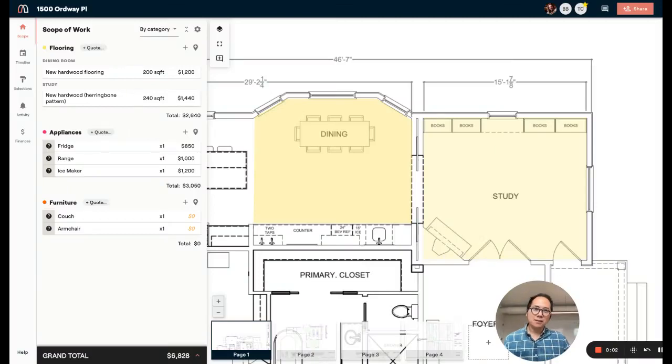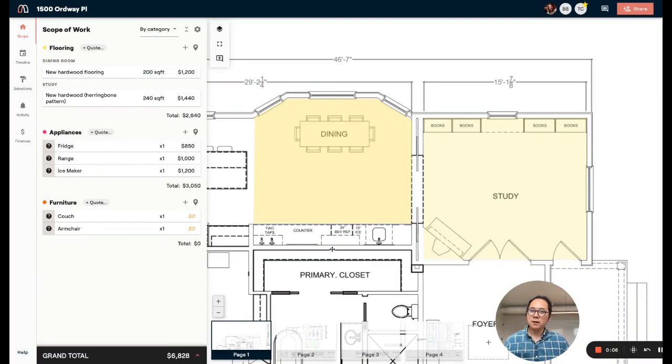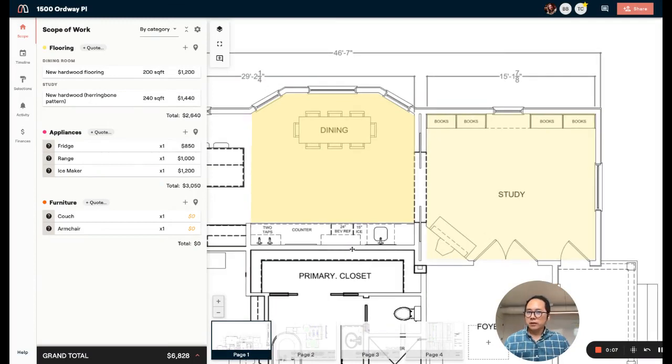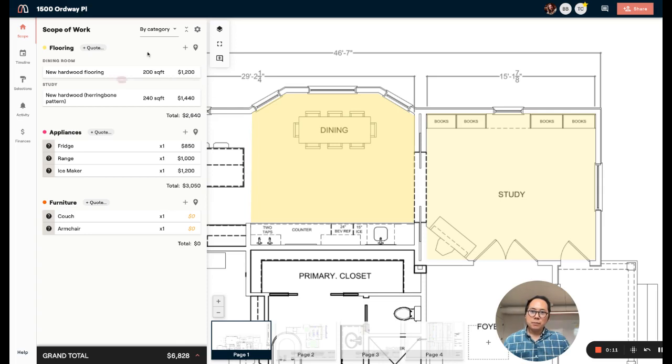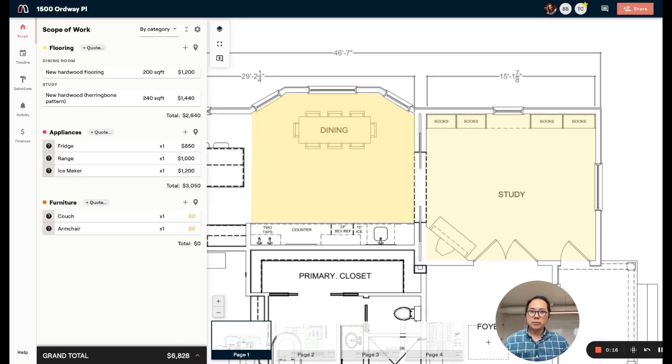Hey everyone, Thomas here, and I'm excited to share with you a new feature that lets you track your quotes in estimating. As you know, very often in a new project, you might put in some estimates, but then you're going to want to actually get some firm quotes from vendors or subcontractors to update your prices.